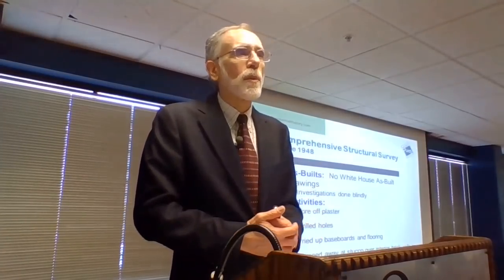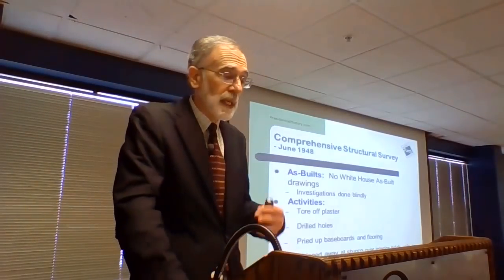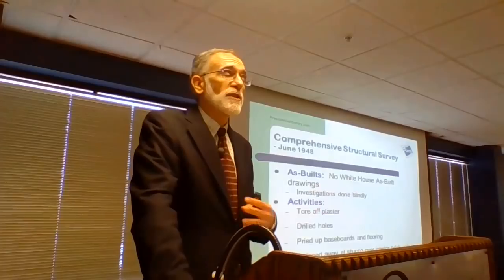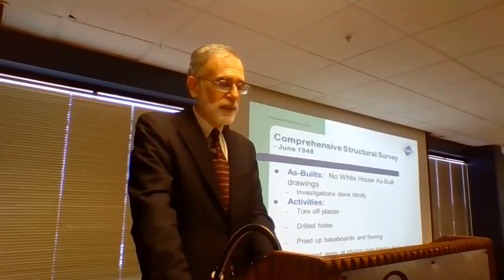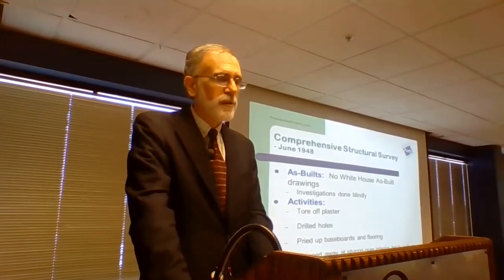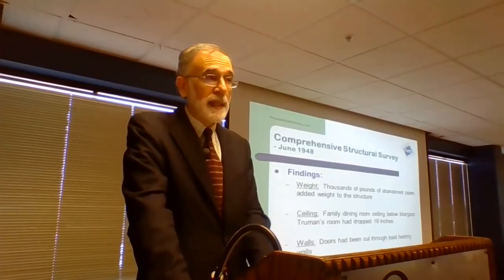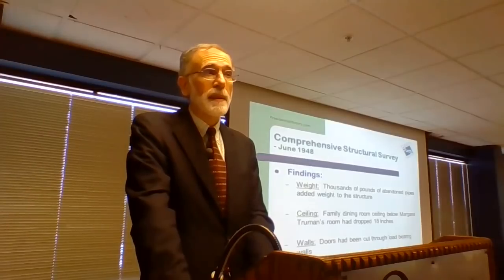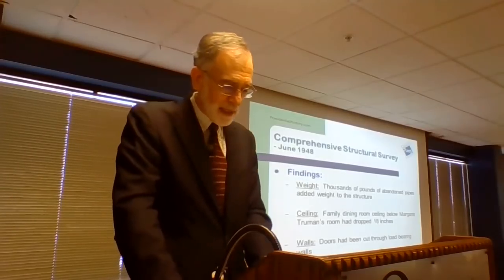So if you were walking on the second floor of the White House, you would feel it, okay? So as they did their structural survey, they found a number of problems. One is that they were hampered by the fact there were no as-built drawings from all of the changes that have been done to the White House over the many years. And so they were doing their investigations blindly, essentially. They did investigations, they tore off plaster, they drilled holes, they pried up baseboards and flooring, they chipped away at stucco over exterior brick walls, and they're looking for the source of the cracks, and they're trying to figure this out. They're finding thousands of pounds of abandoned pipe that are adding to the weight and pushing down the White House into the soft clay and sand.